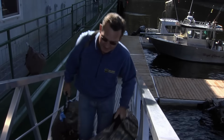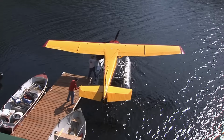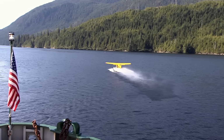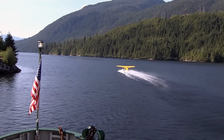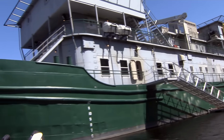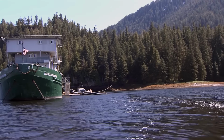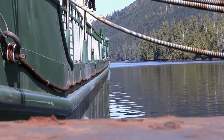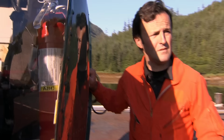Actually, the weather was always a consideration. This is Alaskan mountain country, and if it gets stormy or the passes get locked in with fog and clouds, that would be a problem for helicopters. However, it's the end of May and the sun was out, and had been for quite a while. And it turns out that that could actually develop into a problem. If the woods got too dry, then the Forest Service could impose what's called a hoot owl restriction, and that would shut the operation down as effectively as a big storm.